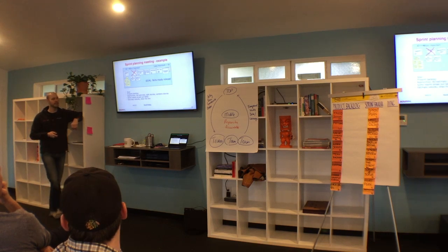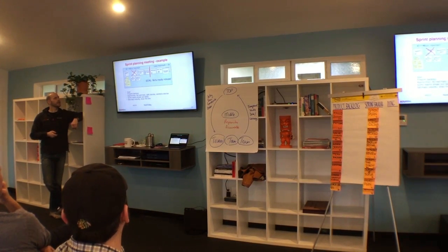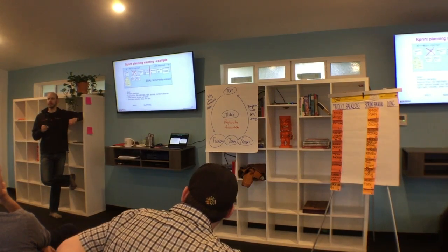There's only one step left then. They say, Scrum Master, can you make visible yesterday's weather? Everything on the left side of this line is likely to get done based on our historic velocity. Product owner, if we show you the stuff on the left side of this line at sprint demo, does that mean beta ready release? In this case, the product owner says, absolutely, that's it. That's what we want. Now, sprint planning has happened.